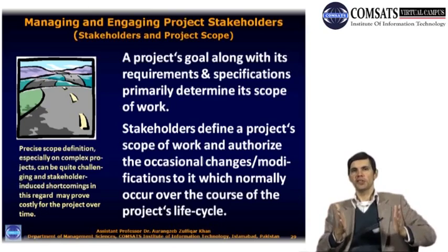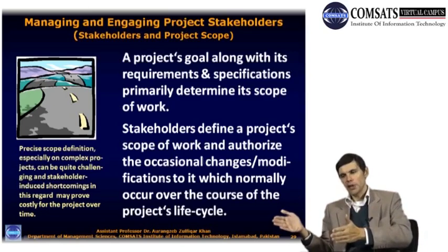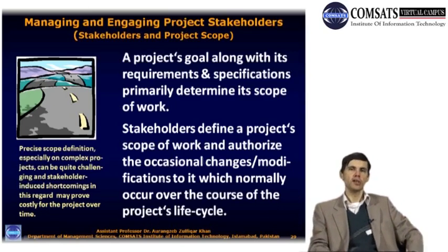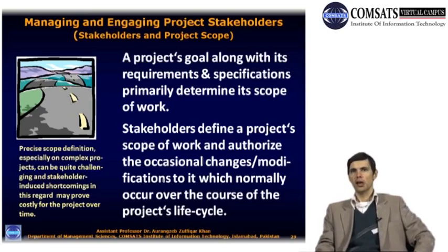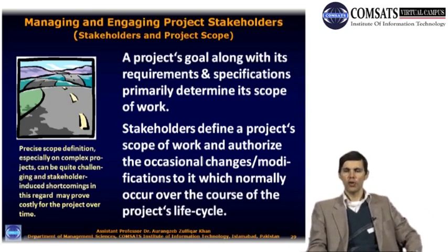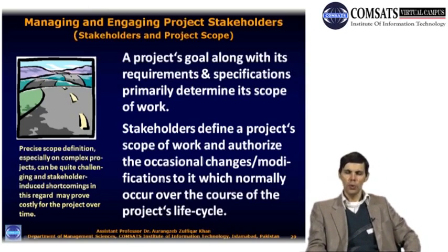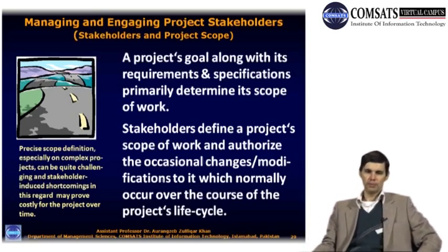Often the scope of a project is not static. You don't start with a scope and keep the same scope throughout the life cycle. It can change. Requirements can change. Specifications can change based on new information which comes in, based on new needs or new wants which have been identified, or new technologies which might have evolved. So it's the scope which is dynamic, and it is the stakeholders who have to define the scope, who have to monitor the scope and who have to control changes to the scope.